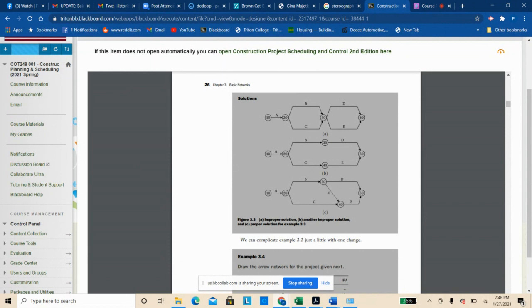Basically, the top path, A, B, D, cannot be differentiated. There's no difference there because you're still just going to the same nodes. You just show different tasks, not necessarily a different path. You don't have that extra node that makes it different. Here, the arrows are the actual task. That's the act of doing something. The nodes, or the circles with the numbers in them, are your points, the states, I guess you would say, from state 10 to 20.